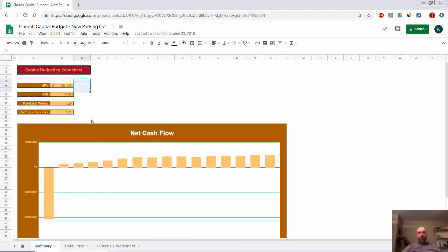So, you want a project with the highest net present value, right? Well, in theory, yeah. All things being equal, you'll hear me use that term a lot, and not just in this video. But yes, because again, that's what the project's worth today. If building not a 53 spot, but a 106 spot parking lot was worth $120,000 NPV, then that would be the better choice based off of your forecast. Okay, it all comes back to those forecasts, and that's why they warrant so much thought. So again, in a vacuum, yes, higher NPV is better, but we'll touch on the kind of qualifier to that here in a second.